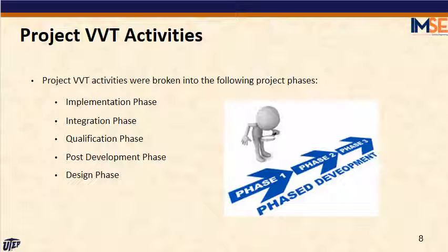Each of these phases contains several documents that are used as guides and milestones to indicate the overall progress of the system. For example, the system requirements were created during the definition phase, and once validated, are then upgraded to the design phase, while the component test plan and validation criteria plan were created during the implementation phase to help pave a way for the integration phase.